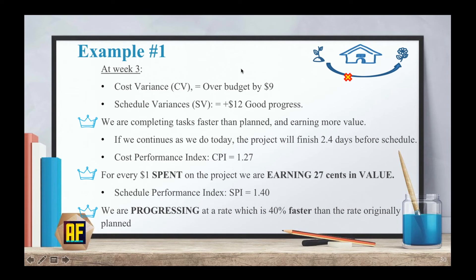Let's summarize what we got. Our cost variance was over budget by $9, which is great. Our schedule variance was plus $12, which means great progress — we are completing tasks faster than planned and earning more value. If we continue as we do today, the project will finish 2.4 days before schedule. We are earning 27 cents for every dollar spent and progressing at a rate 40% faster than originally planned. This project is fantastic.